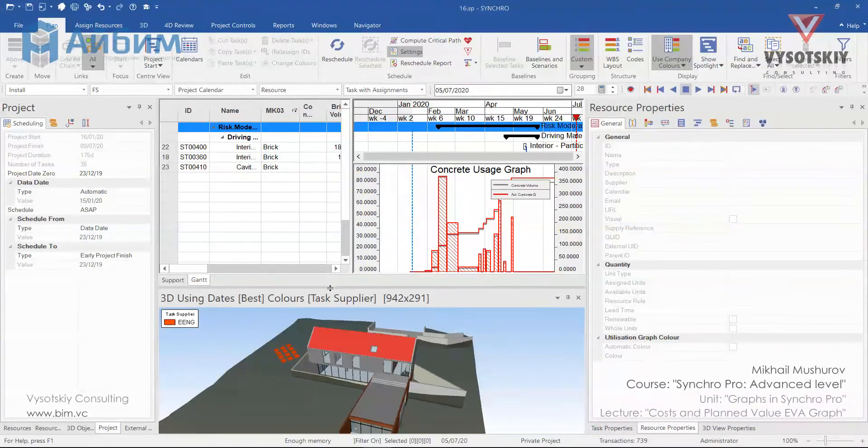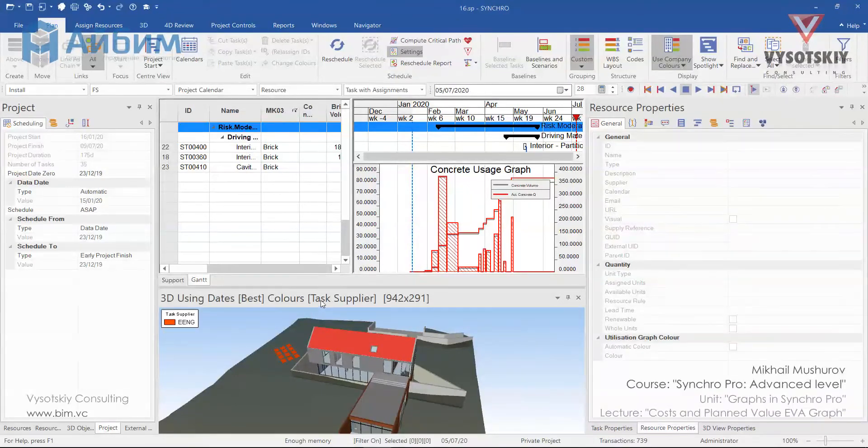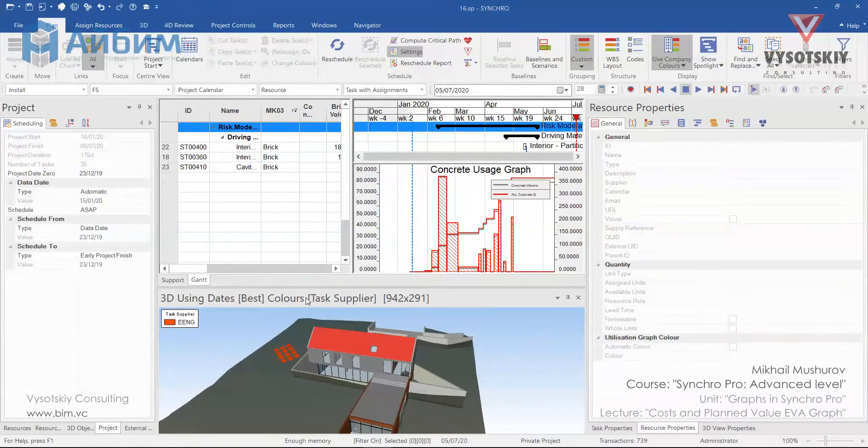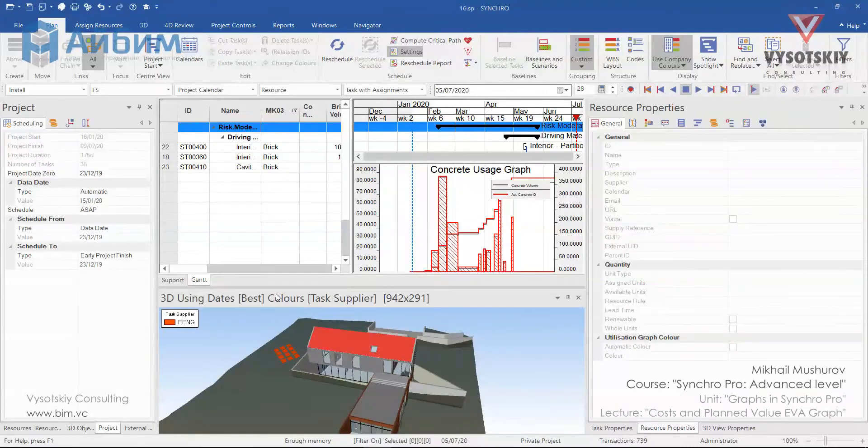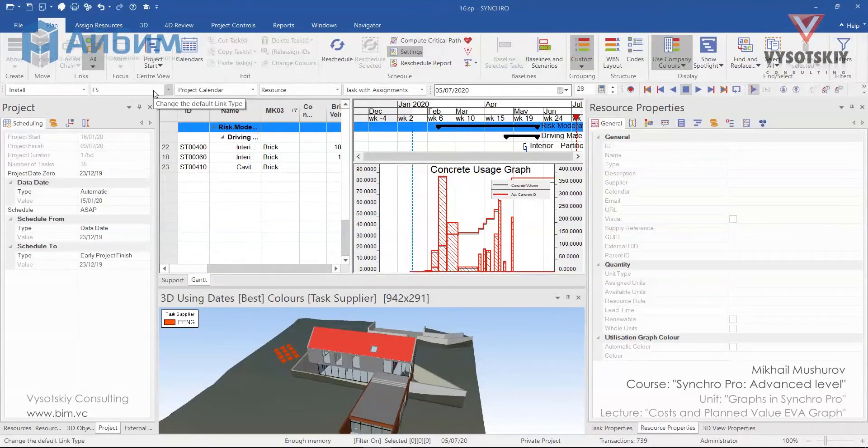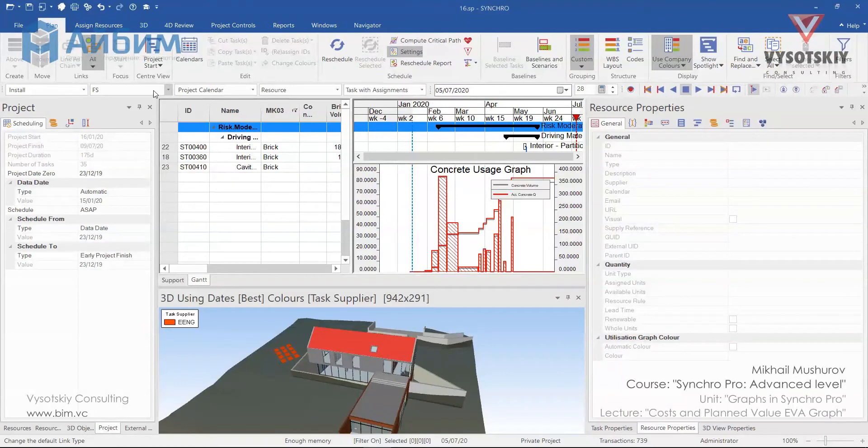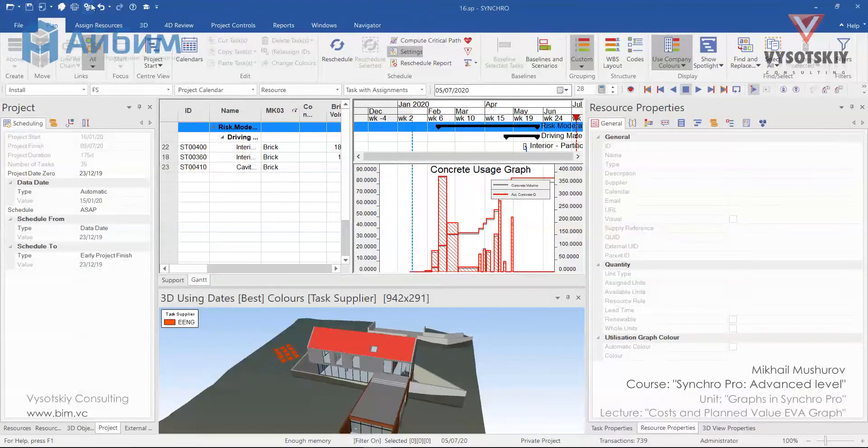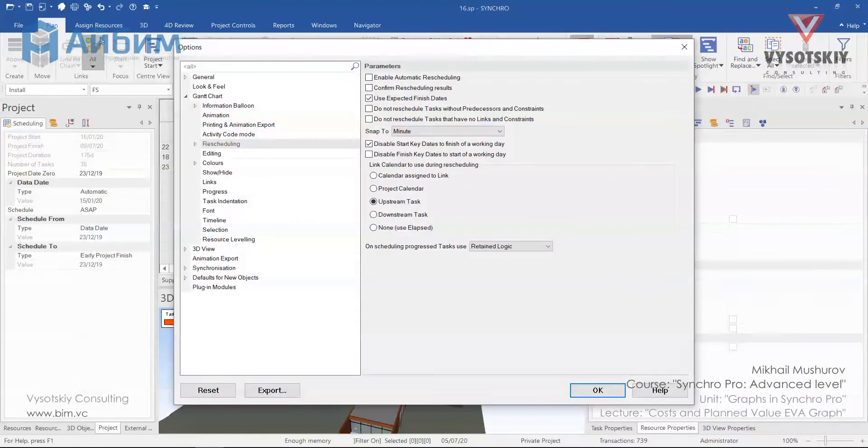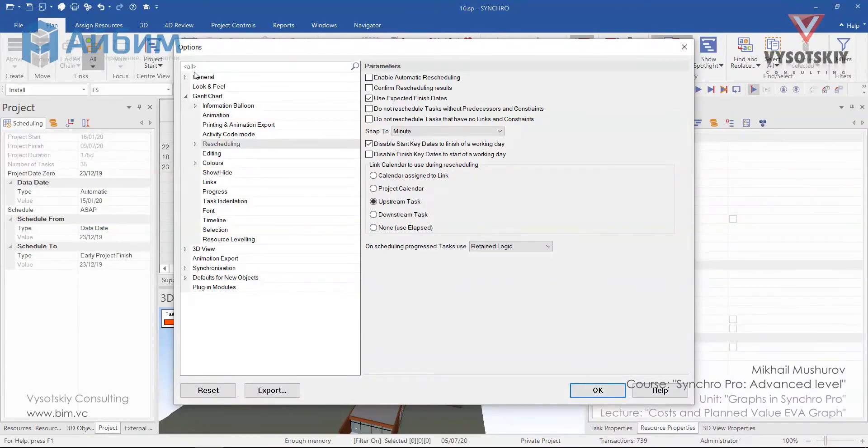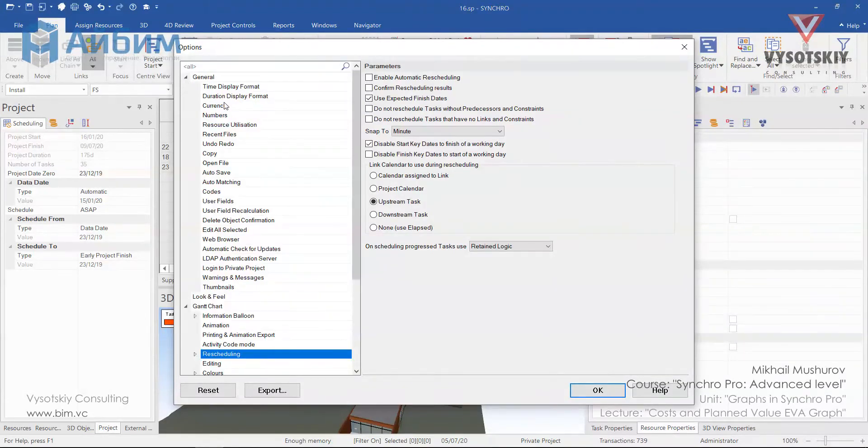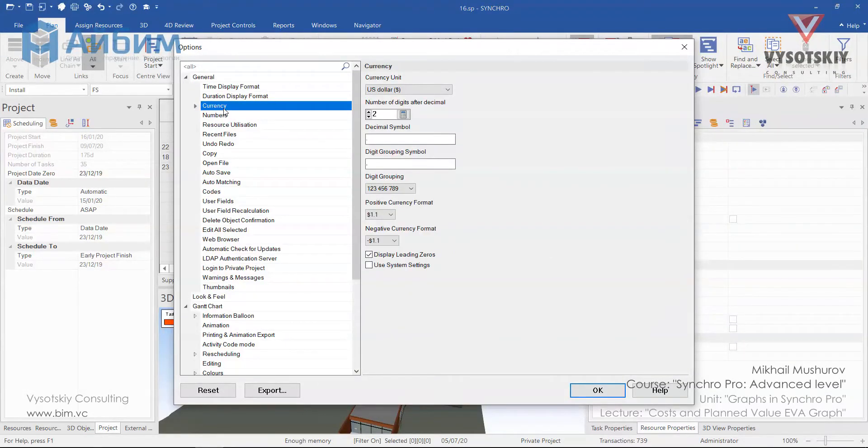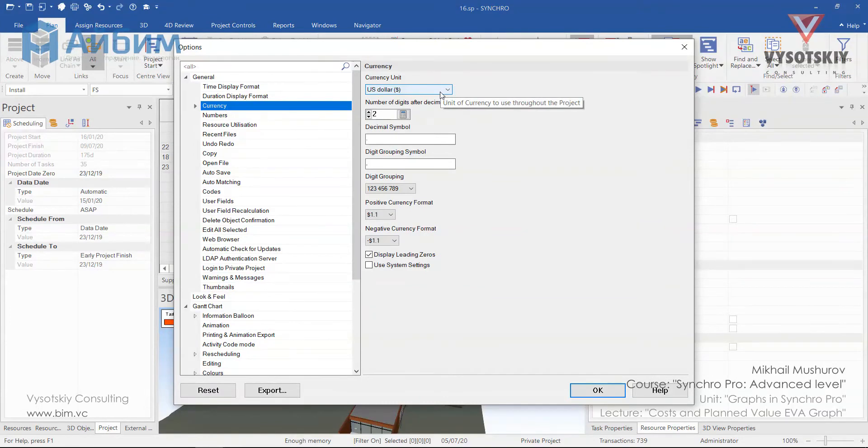Costs can be either assigned to the resource, thus tasks cost is computed based on resource utilization, or by assigning a direct cost to a task. But first of all, we should check if the correct currency is selected for a project. Go to the options, click general and currency. So we'll be working with dollars.